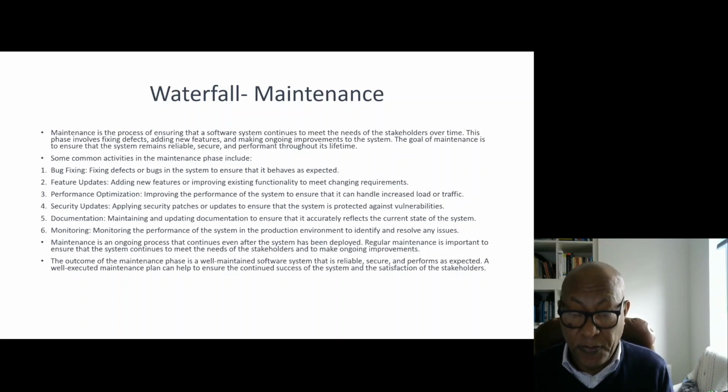One thing which is not mentioned here is what happens if the system falls apart and doesn't work. Okay, we have to have a way to roll back to the older system if the whole system doesn't work. So we have to have those kinds of arrangements, well-established plans in place in case something goes wrong.